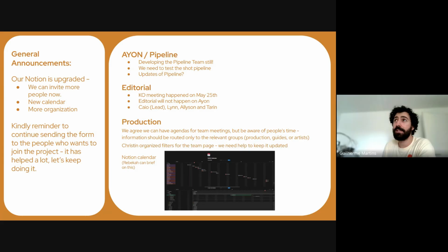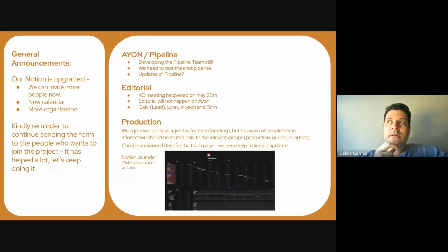And the plan is still to lock things by sequence, editorial wise. Correct. So the idea is Kyle is the most experienced guy, so he's going to be overlooking the entire editorial. Then per sequence, so it's not a lot of work for Kyle, we're going to have an editor for 2 or 3 sequences, depending on how big they are.